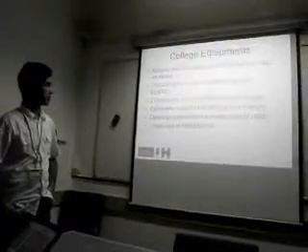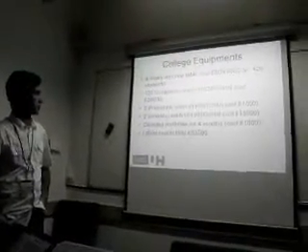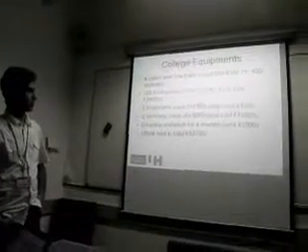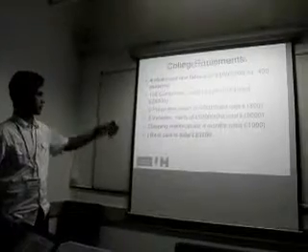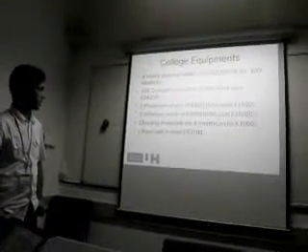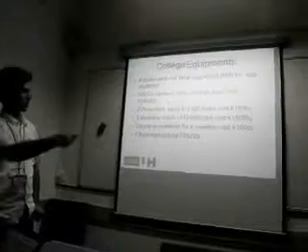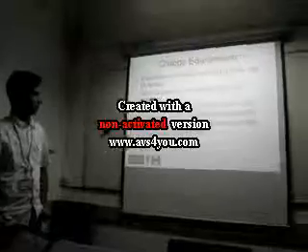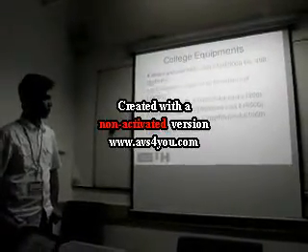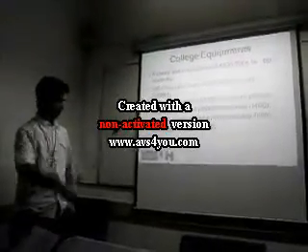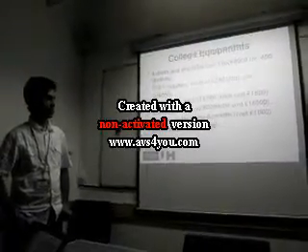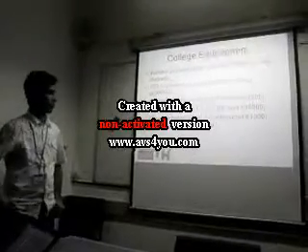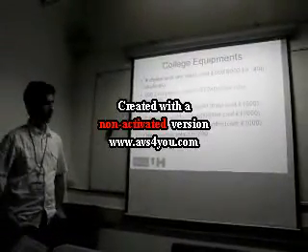In the start we consider 400 students, so 8,000 for the furniture, and 100 computers at 240 each, so the total cost is 24,000. 2 projectors, each one is 900, so the total is 1,800. 2 vehicles in the start, 9,000 is the cost of each one, so the total cost is 18,000. And similarly, cleaning and other material for 4 months is around 1,000 pounds. So the total cost just for the equipment is 53,700 pounds.